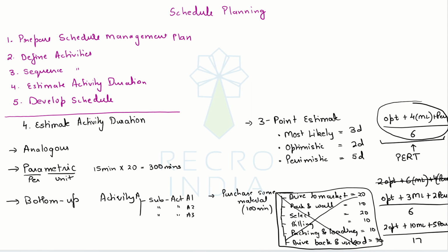Then somewhere I'm also thinking about that, okay, say for example critical path. Critical path should take about 15 minutes, but if someone doesn't understand it or they have some confusion, in a worst case scenario I may end up taking 30 minutes to explain critical path. Or in a best case scenario, if there are no questions and everyone understands it in one go, then I might just need 10 minutes to explain that topic. So 10 is my optimistic estimate, 15 is my most likely estimate, and 30 is my pessimistic estimate, and I can calculate my duration using some weighted average.